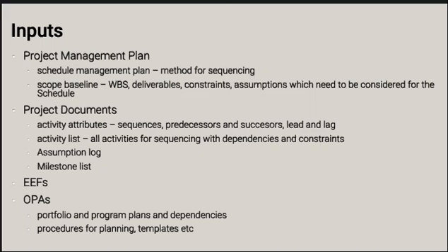Assumption logs may provide assumptions regarding the sequences of the activities. Like, I don't know, if the office is being moved from one place to another, you assume that the furniture is going to be worked on two days after the site procurement or something like that. So if that assumption was different, then the sequencing of the activities would be different. So the assumption log might also provide some information about this.